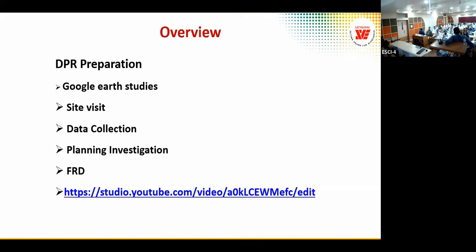of the site, a 3D digital model of the site, including the tree plantation, everything, the trees that are available in the site. And nowadays, another major aspect is the NGT, National Green Tribunal, which is, in fact, not considered. Right now, I'm doing a project in Srinagar, Kashmir. There, the tender is floated, the contract is to be awarded, and there is a PIL on the project. That means there is a failure in the DPR. You have not considered green tribunal requirements, environmental requirements, in the DPR stage itself.